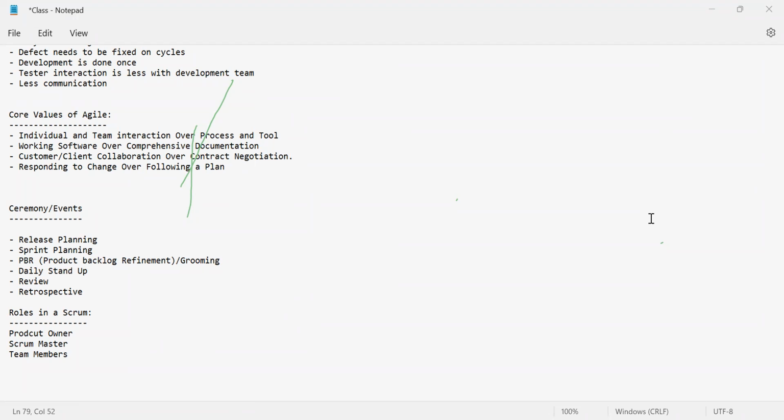That's his own job. He breaks it down into different modules. As we broke down WhatsApp into different modules, he prioritizes which one he needs first, so that it can be pushed to production and he will be able to do some business with it.